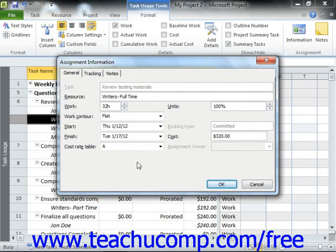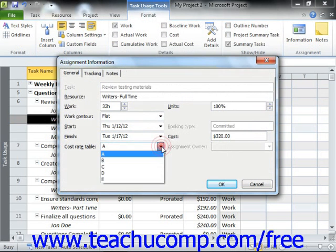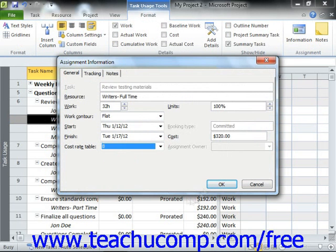In the Assignment Information dialog box that appears, click the General tab. On this tab, you will see the assignment information for the selected resource for this task. Use the Cost Rate Table drop-down arrow to choose which cost rate table to use for this task. Then click the OK button to apply the new rate to the work assignment for that task.